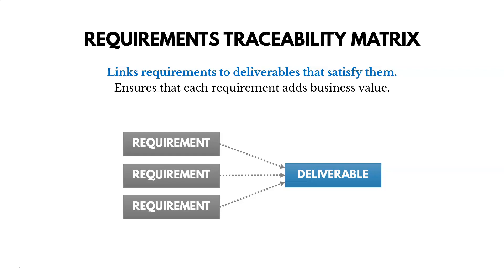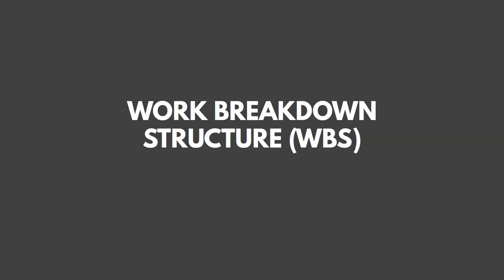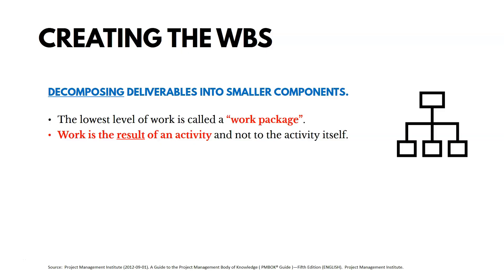After we collect requirements and define the scope, we create the Work Breakdown Structure, or WBS. This takes our scope and decomposes it into smaller components to make it easier to manage down the road. The WBS is often represented as a hierarchy — either as a visual chart or through indentation in a Microsoft Project or Excel file. The lowest level of work in a WBS is called the work package. The work package is the result of an activity, not the activity itself — I like to think of work as a noun.